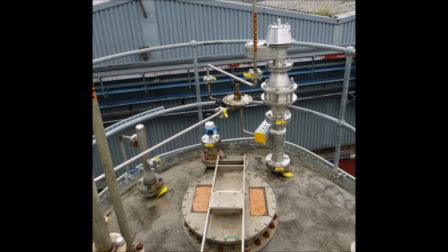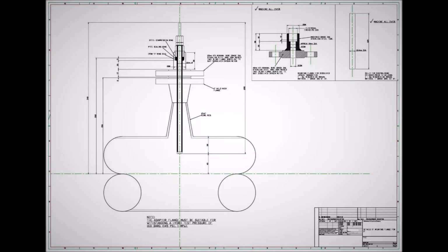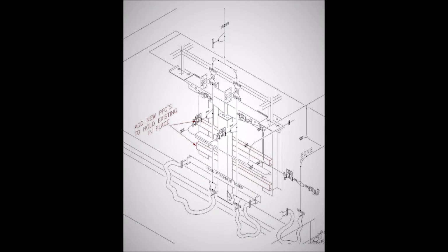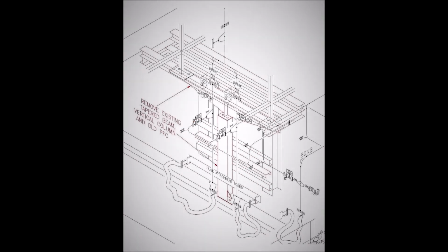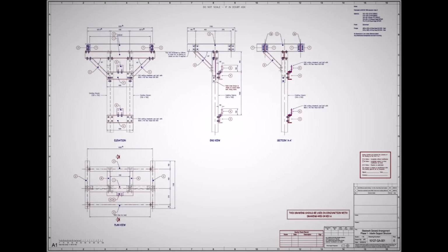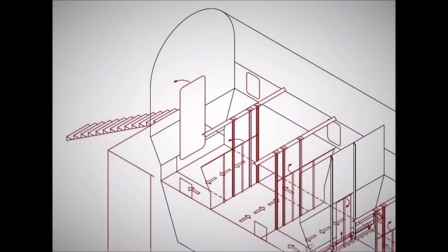It's easy to upgrade the basic layouts to define the instruments to order. Here's an example of insertion depth of an inline instrument to suit the pipe spec branch tables. Civil and structural. Basic civil or structural requirements are sketched so the discipline engineer can create fabrication-ready designs with calculations. Health and safety. Early identification of issues to address and incorporate into the scope of work.